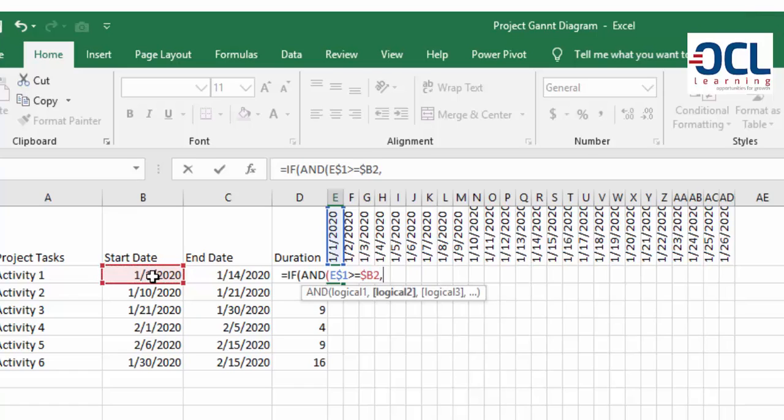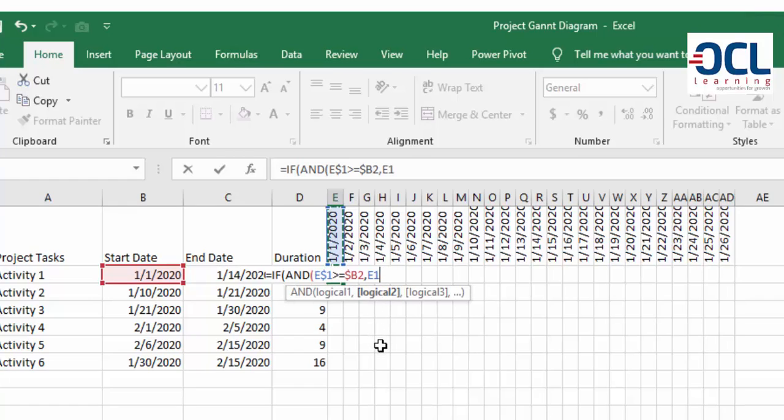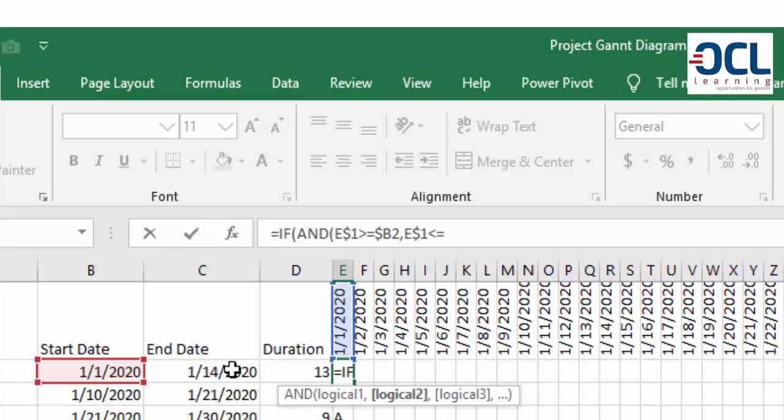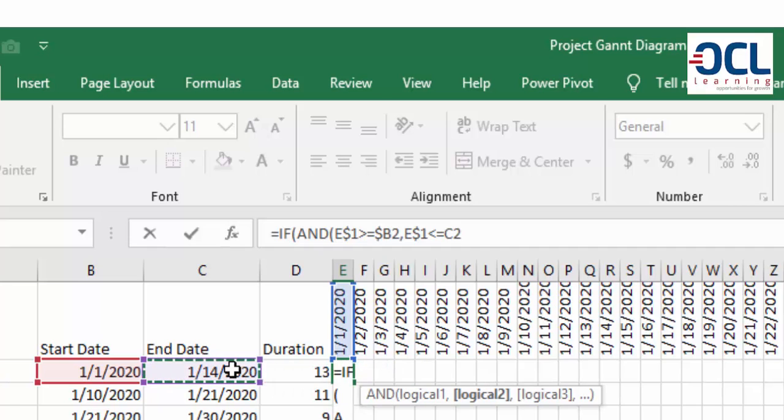The second logical test is whether this date, and I'll still lock the row which is pressing F4 twice, is less or equal to the activity end date. And I'll lock the column C by pressing F4 three times.